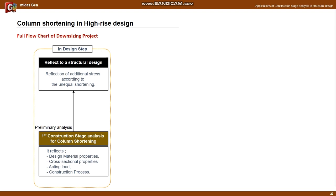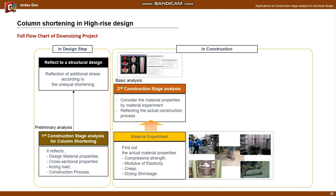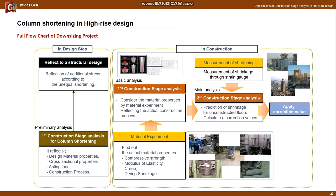Next is the entire process of the column shortening project. In the initial structural design stage, the first construction stage analysis is performed by applying the basic inelastic material model and the assumed construction process - this is called preliminary analysis. In the design step, reinforcement for additional member forces is reflected through preliminary analysis. When the construction site is opened, material experiments are conducted to obtain curves for compressive strength, modulus of elasticity, creep, and drying shrinkage. Secondary analysis is performed by reflecting these experimental values and the actual construction process plan - this is called the basic analysis. Finally, the third construction stage analysis is performed considering the changed construction process and construction environment, called the main analysis. Through accurate prediction considering the measured shortening on site, construction corrections are made for the shortening of upper stories not yet poured.